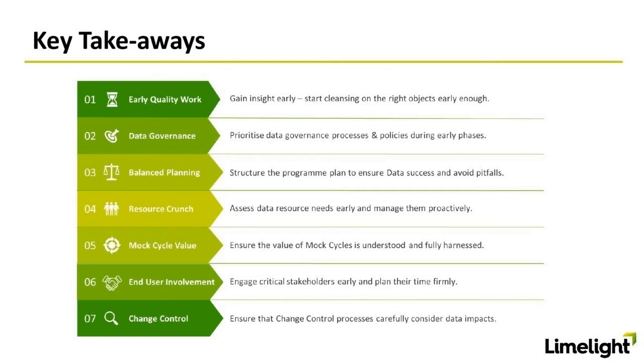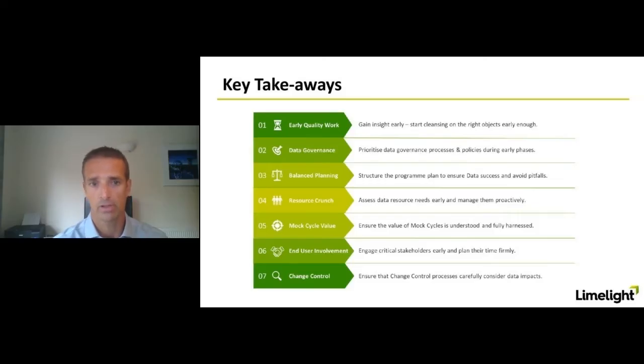In my mind, Class Jan, there are two aspects to this in terms of the costly repercussions. We've talked quite a bit about making sure that the cleanse is in place, that the resources are in place, and all of these early watch points that are on the screen right now, down to really number 6, are making sure that the execution of the data migration, which, as I said, is number 2 really just behind functional build in terms of risk to your critical path, can happen on time, genuinely, to the extent that they're aspired to happen. Meaning, if you set out to do all of your master data objects in a certain mock, and all of your master and transactional in the next mock, for example, you can genuinely do that, and you're not constrained by the quality of data or the availability of resource, and so on.